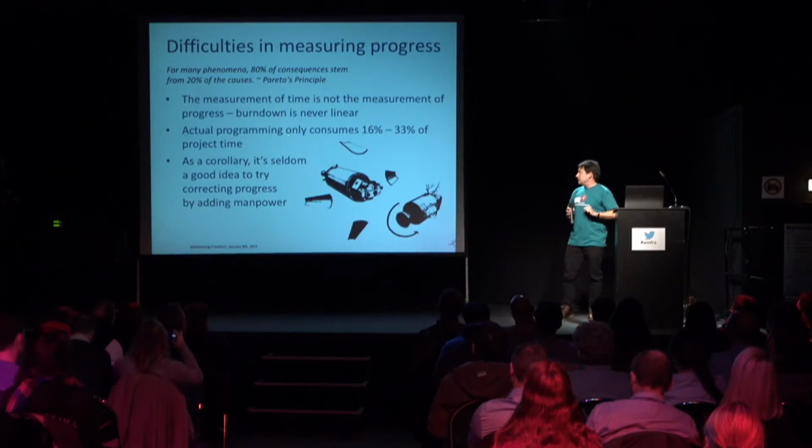You don't know if your developers are writing code or if they're taking care of their Facebook pages. If they've just spent 8 hours working on the project, or 5 hours working on the project, you don't know. Burn down is never linear. It's a roller coaster. We're talking about a roller coaster. And there's a big ramp at the end of it because as the project due date comes, everybody starts getting really active all of a sudden, and the last 20% of the time consumes 80% of the effort in the project. Please never forget that.